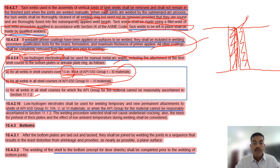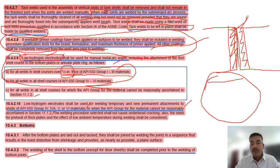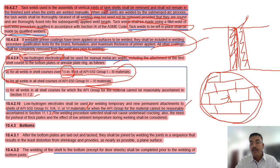Low hydrogen electrodes shall also be used for welding temporary and permanent attachments to shells of API 650 Group 4, 4A, 5, and 6 high-grade materials, or when the API group of the metal cannot be reasonably ascertained. Importantly, the welding of the shell to the bottom shall be completed prior to welding of the bottom joints — meaning the circumferential weld connecting the shell plate to the bottom plate must be completed first before proceeding with the bottom plate-to-plate welds.